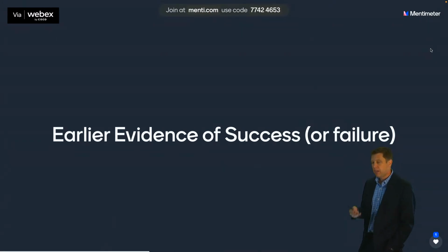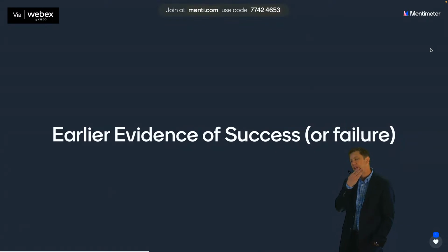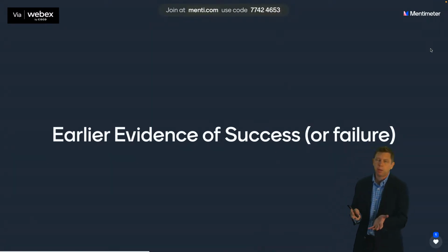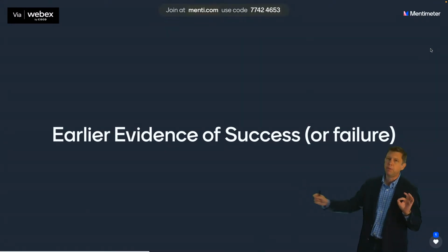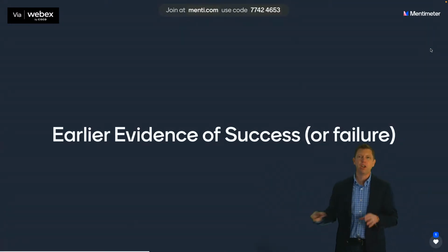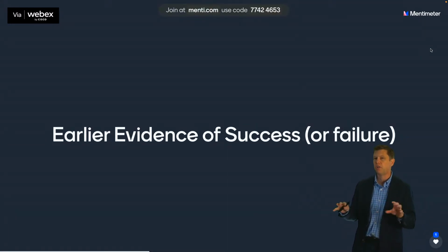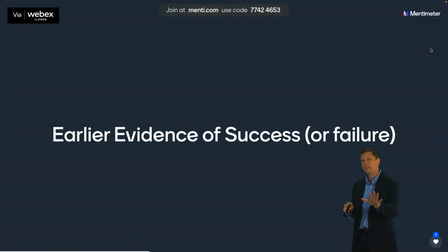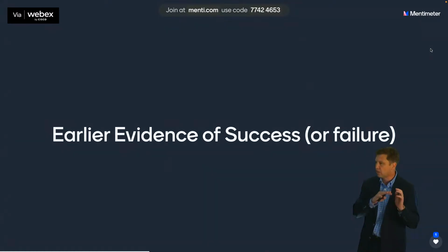If you've got a development team and the customers, you sit down with the customer and you're like, okay, what's the smallest thing that could possibly provide value? Like take the billing thing, for example. And they say, okay, the smallest thing is being able to process just this one type of bill all the way through to where you get the input from it and it gives you this output over here. That would be the smallest thing that we can start showing, even if it's not the system of record yet, it's the smallest thing that can start doing real work. Let's make that our MVP.